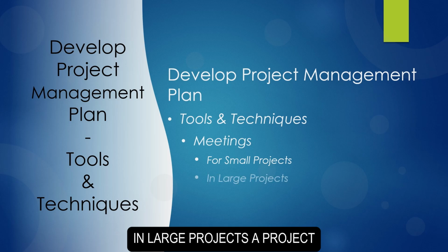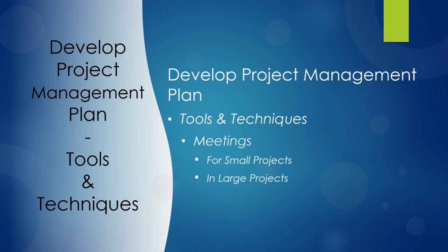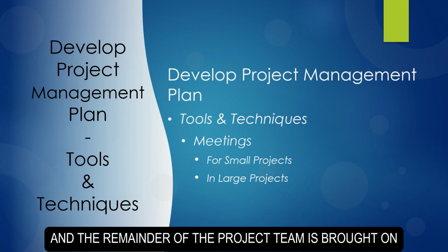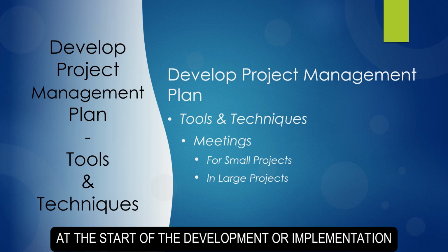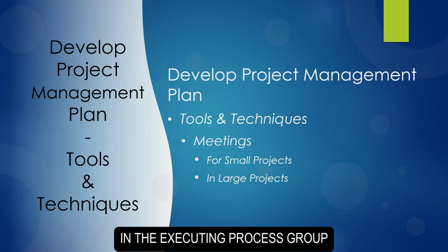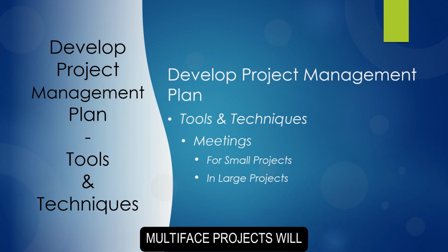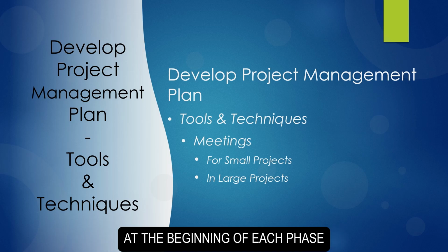In large projects, a project management team normally does the majority of the planning, and the remainder of the project team is brought on when the initial planning is complete, at the start of the development or implementation. In this instance, the kickoff meeting takes place with processes in the executing process group. Multi-phase projects will typically include a kickoff meeting at the beginning of each phase.